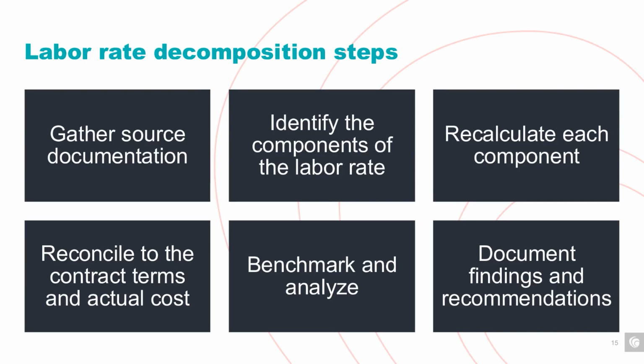So you're going to want to highlight any overcharges, potential duplicate costs, or non-compliant charges you may have found, and discuss these with your project management team during negotiations. If you perform this analysis after the contract has been executed, it's still worthwhile to document your findings, as these observations can be used for future recommendations to improve your contracts, improve your documentation requirements, along with your audit procedures.